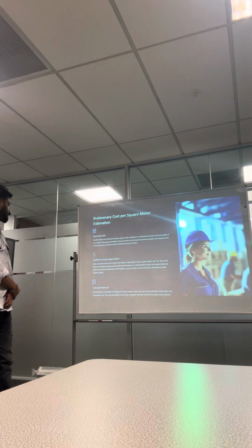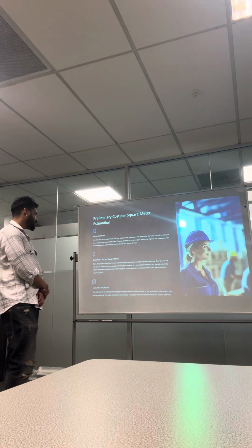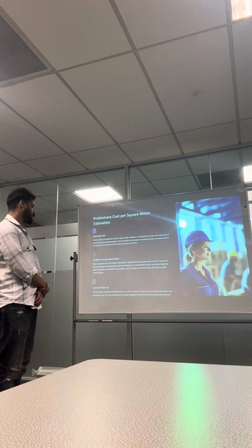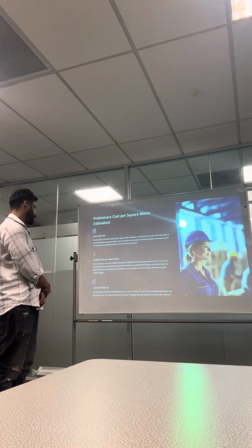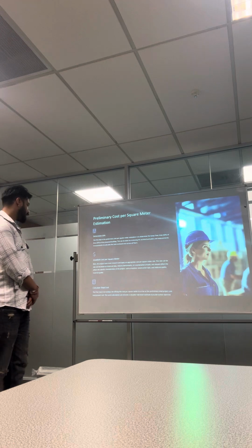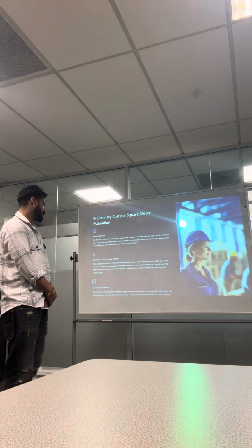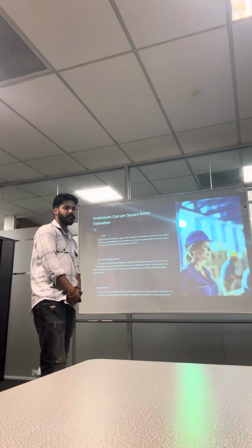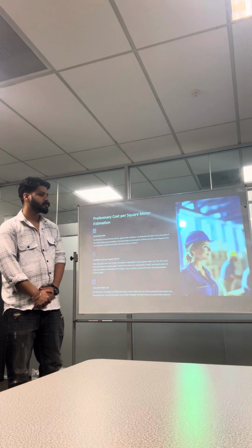Calculate the total cost. The final step is to multiply the GFA by the cost per square meter to arrive at the preliminary total project cost. This quick calculation can provide a valuable high-level estimate and guide future planning. Next, please.